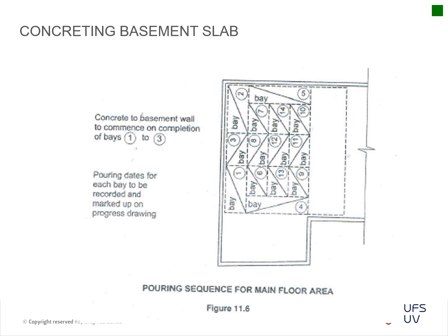Okay, then they just went into more detail of actually construction bays. So they've got certain blocks that they do their pours, because you can't pour a continuous block. Remember that site visit where we had the construction joints and the saw cut joints for the expansion and movement of your concrete. That's basically why you have to plan boxing in your concrete pours within the specified parameters from the contract or engineer. Okay.